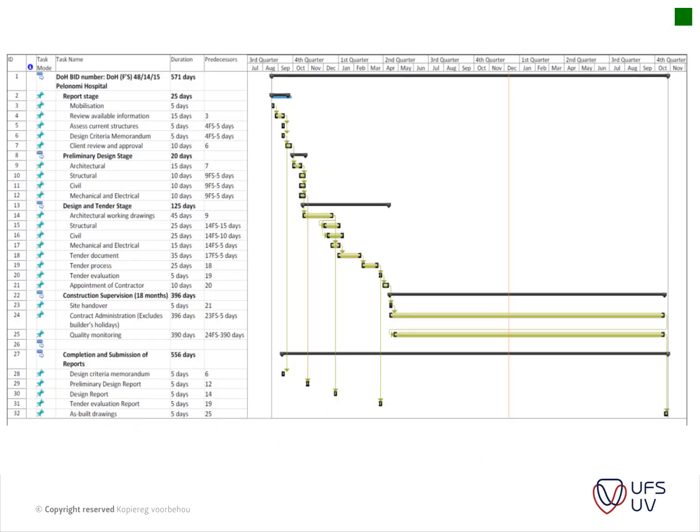Here's an example of an actual master schedule done for a tender at the Polynomial Hospital in 2015. You can get an idea of the structure: you list your different stages and then look at what you're going to do underneath each stage. It's up to you how that is put together.